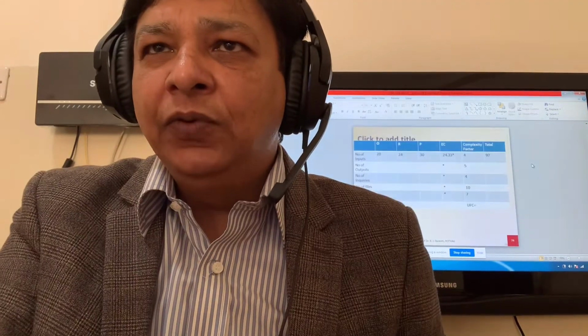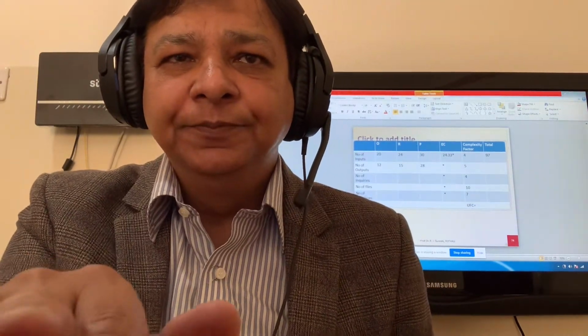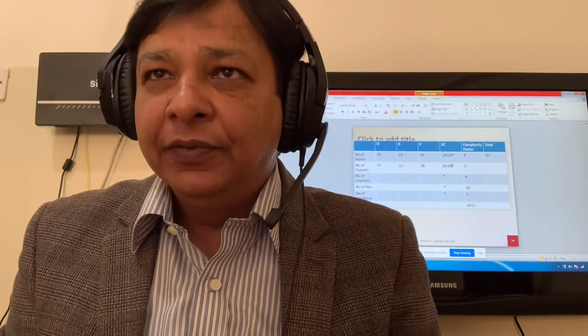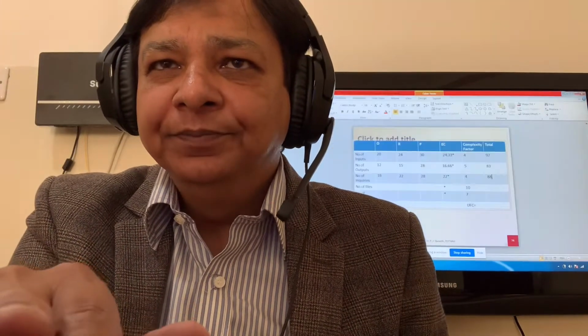12, 15, 28 for outputs. What's the EC value for output? 16.66, multiplied by 5, the complexity factor. So what's the value? 83.33. So we can write 83. Then 16, 22, 28 for inquiries, so it's 22 multiplied by the complexity factor. Very good. Everybody has the same answer.